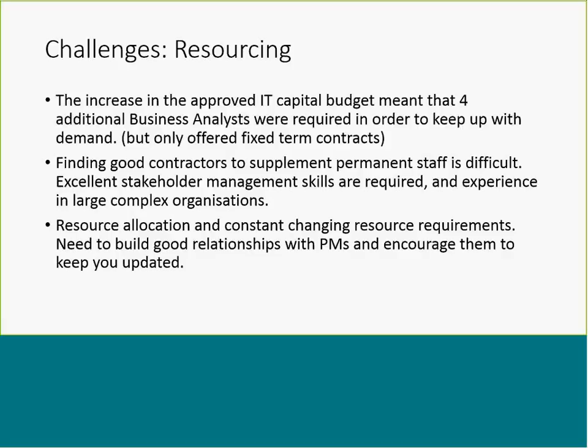Building relationships with good recruitment agencies, I've found, has been very important because they understand the kind of people I'm looking for. Resource allocation is always a problem because resource requirements are constantly changing. Projects change and suddenly something doesn't get approved or what have you. So I needed to build good relationships with the project managers and encourage them to keep me updated when things do change, because I don't think to do that.